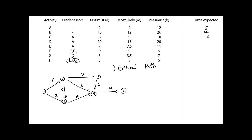The expected times for all activities are: A = 5, B = 14, C = 9, D = 15, E = 8, F = 9, G = 4, and H = 5. These TE values will be used to evaluate all possible paths through the network to determine which path has the longest duration — that will be the critical path.